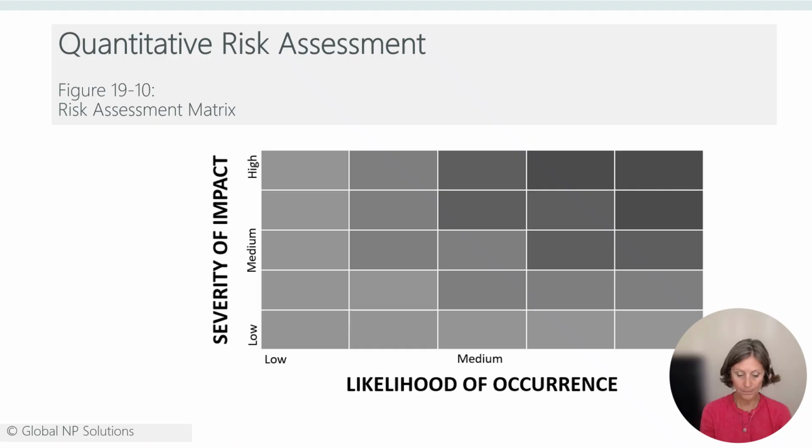Qualitative risk assessment. Qualitative risk assessments are used to help prioritize risks identified during lean workshops and in the general course of new product development work. Product and process risks are categorized by severity of impact and probability of occurrence, as shown in Figure 19-10. Events that are highly likely to occur with a severe impact in the upper right-hand corner of Figure 19-10 are eliminated by changing the product priorities and properties or the project requirements.